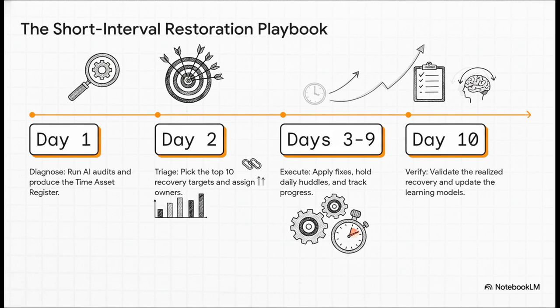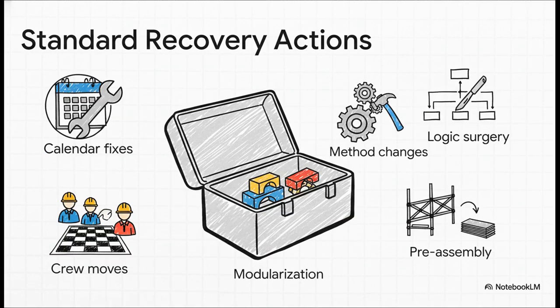It is relentless. So, what kind of actions are we talking about here on the ground? Well, they can be anything from simple calendar fixes to some pretty complex logic surgery on the project schedule. It might mean moving your best crews to the most critical tasks, changing a construction method, or maybe finding new opportunities to pre-assemble components off-site.